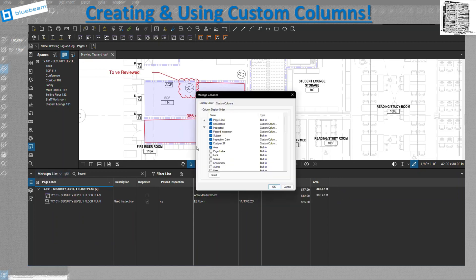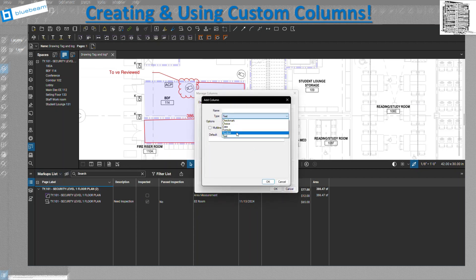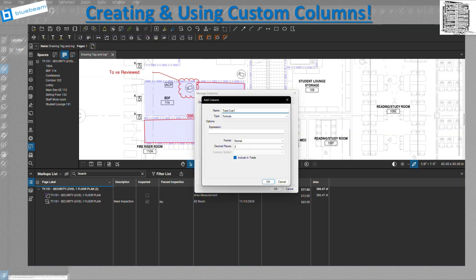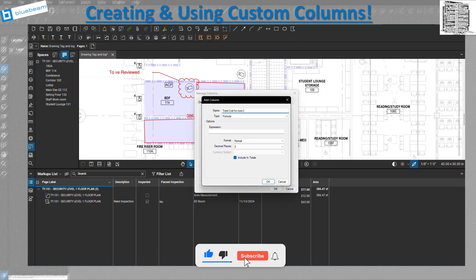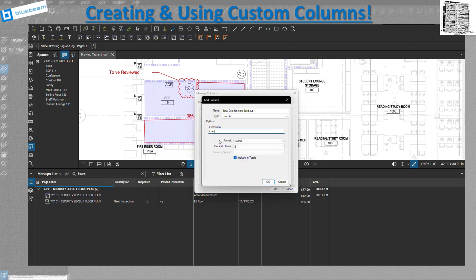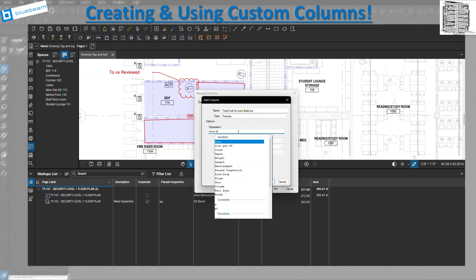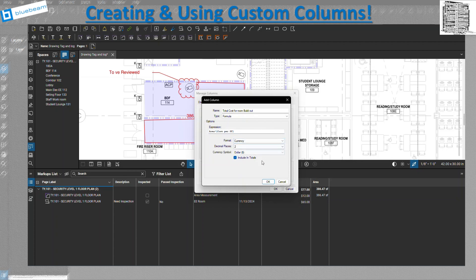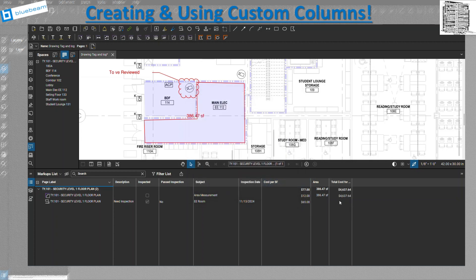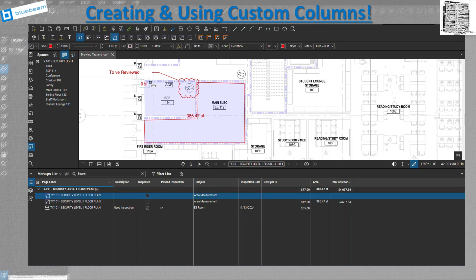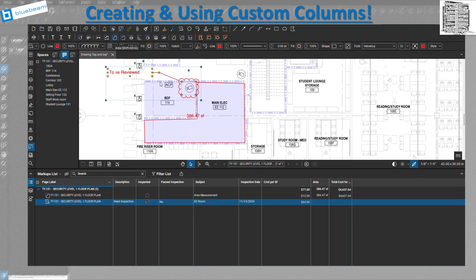To calculate the total, I go back to Manage Columns, add a Formula column, and set the expression: Area times Cost Per Square Foot (using the star operator for multiplication). I set the format to currency and hit OK. Now the formula column shows up and calculates the total automatically. Let me draw another area — for example, this BDF room — and it gives me the total cost for that space as well.